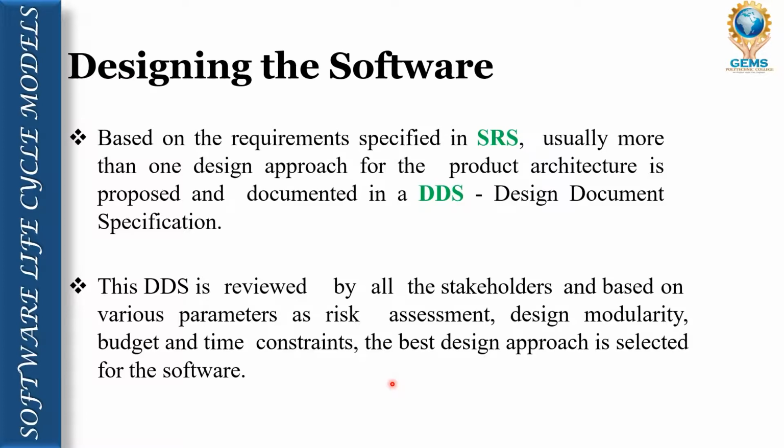Based on the DDS, the stakeholders review it. During the review, they use parameters like risk assessment, design modularity, budget, time constraint, and finally from the two or three design proposals, they pick any one, and that becomes the final, which will go for the coding part.